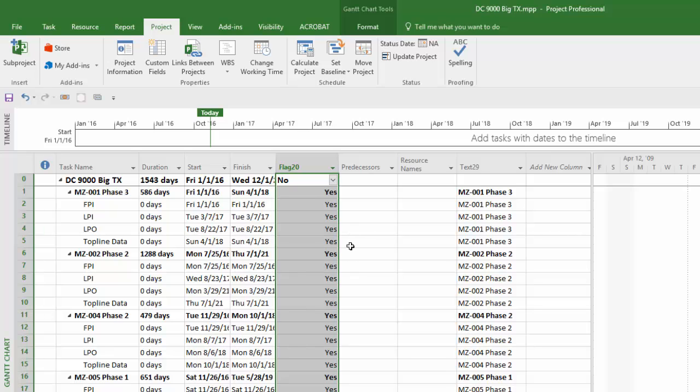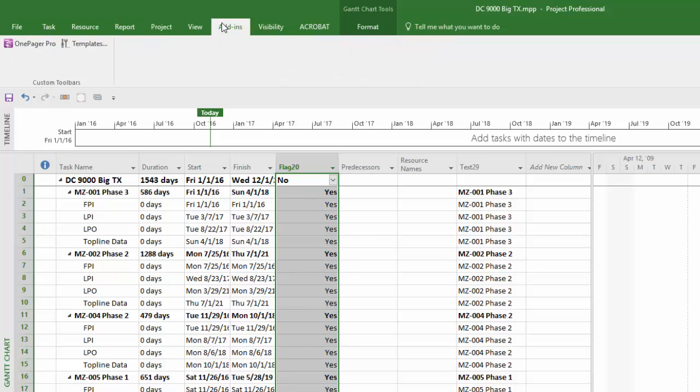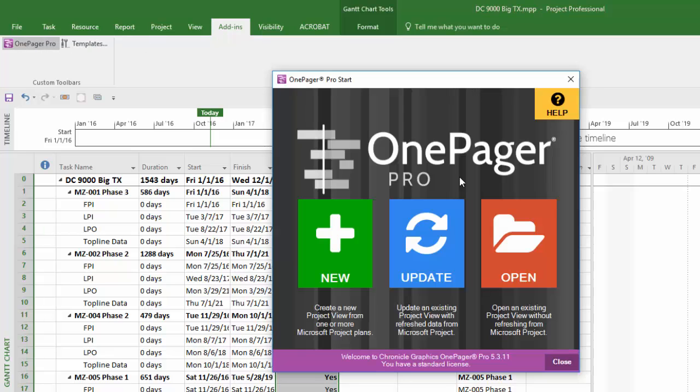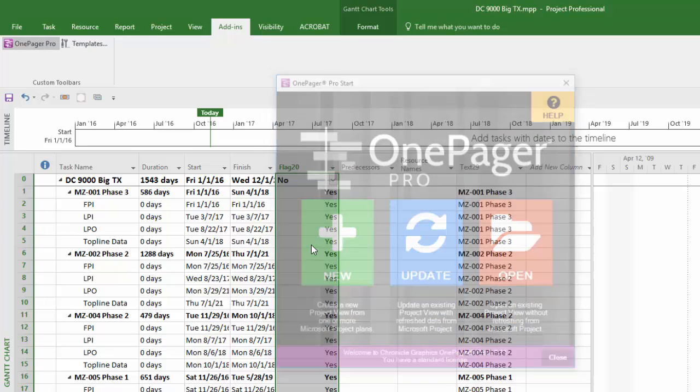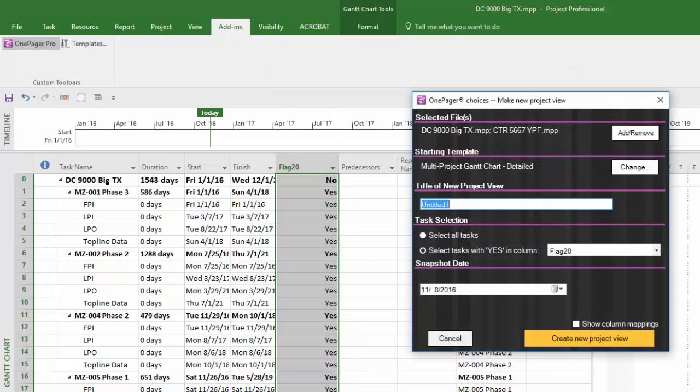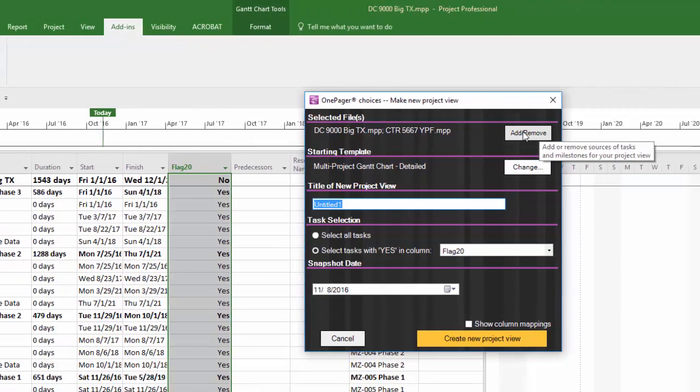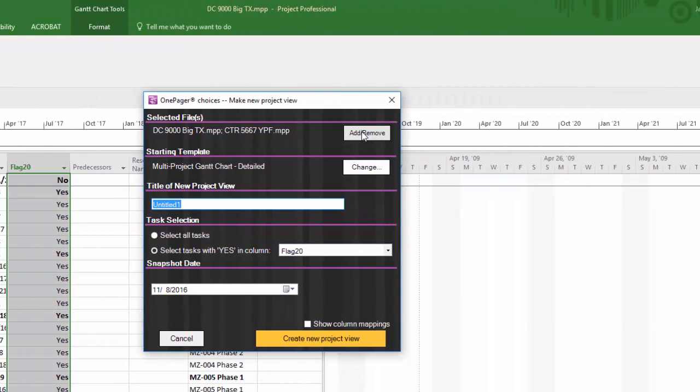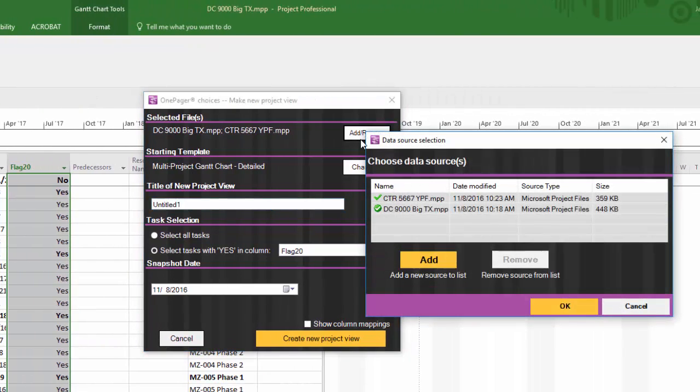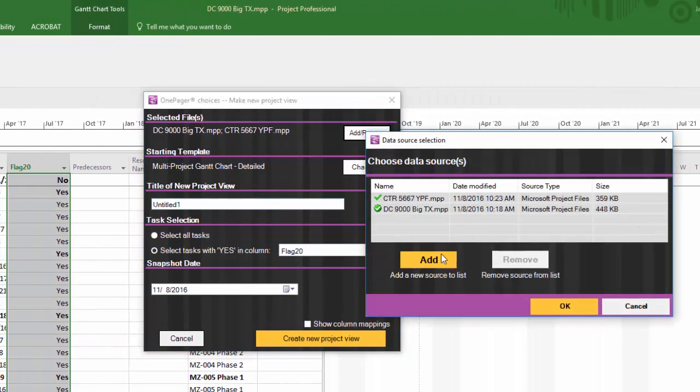Once you have those two items set, launch OnePager and click New. The first method of creating a OnePager Gantt chart from multiple project files is only available in version 5.3 or later and begins by clicking Add/Remove in the selected files section of the OnePager choices form.